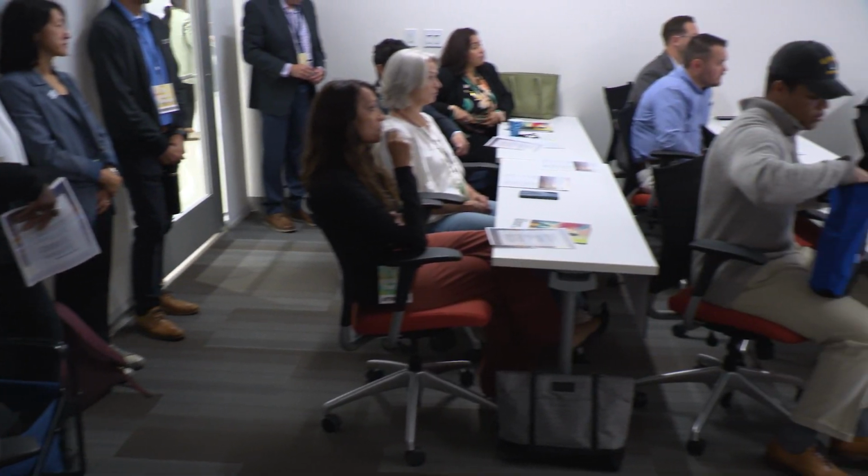Yeah, that's a great question, Matt. If I could, I'll take a stab at that. I think the decision making is typically driven by value and compliance. I can speak for our team at AHCB. Because of the goals that we're required to meet, we are always looking to identify opportunities to maximize compliance, to engage certified firms. So while it might make sense for architectural precast to be held by structural precast, maybe there's an opportunity for the former to provide more value and participation.